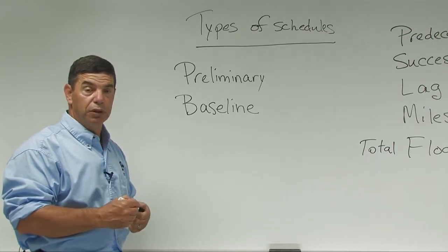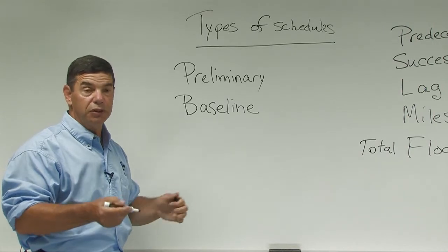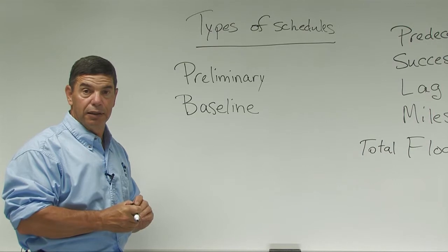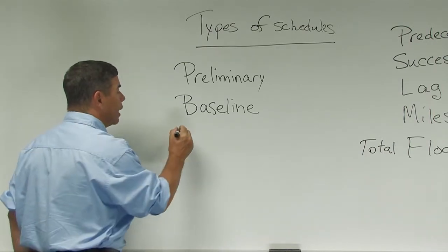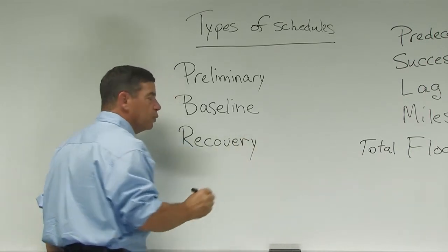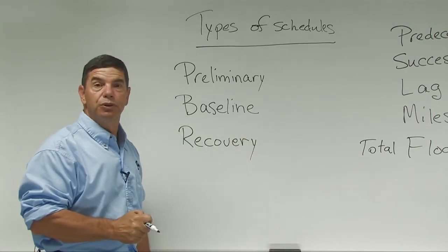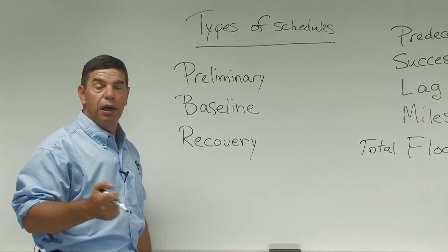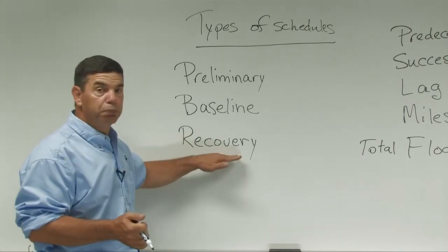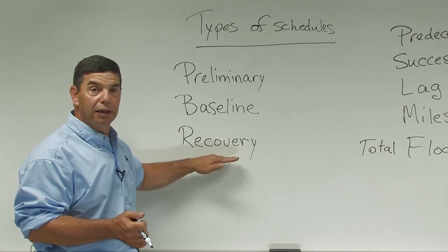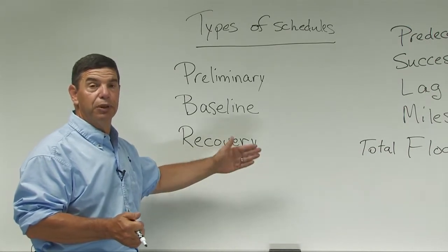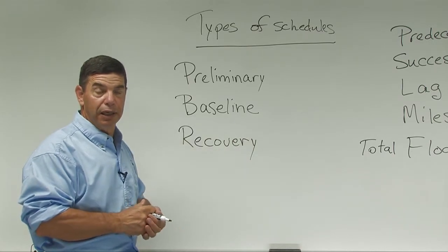As the project moves along, there are times where, let's say, it rains for a week straight and the work is delayed. Then there will be a recovery schedule. The recovery schedule again becomes a negotiation between the contractor and the MnDOT supervisors, saying, and here's how we will bring this project back on track so that it doesn't continue to slip and the project just be delayed indefinitely.